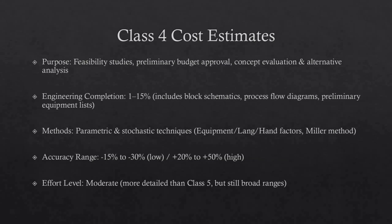Class 4 estimates are generally prepared based on limited information and subsequently have fairly wide accuracy ranges. They are typically used for project screening, determination of feasibility, concept evaluation, and preliminary budget approval. Typically, engineering is from 1% to 15% complete and would comprise at a minimum: plant capacity, block schematics, indicated layout, process flow diagrams for main process systems, and preliminary engineered process and utility equipment lists. Class 4 estimates are prepared for purposes such as detailed strategic planning, business development, and project screening at more developed stages.